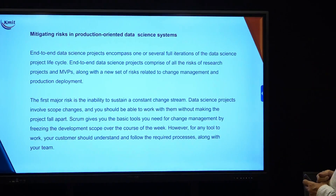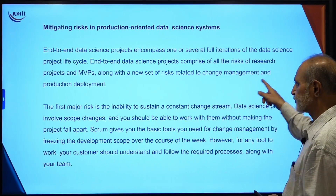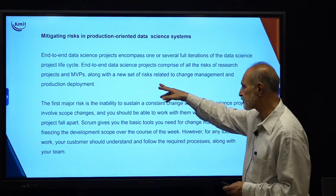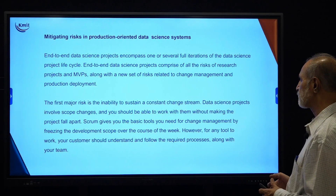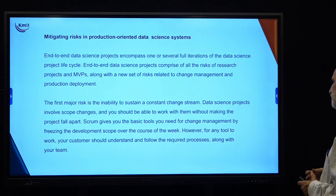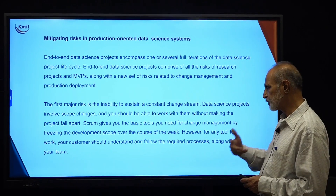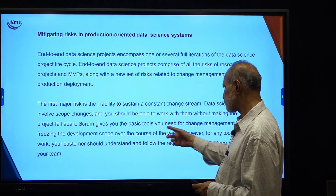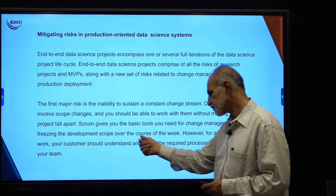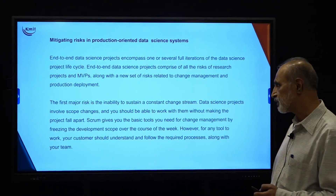End-to-end data science projects encompass one or more full iterations of the DS project life cycle. They comprise all the risks of research projects and MVPs, along with a new set of risks related to change management and product deployment. The first major risk is the inability to sustain a constant stream of changes. Data science projects involve scope changes that, over time, can make the project fall apart. Scrum gives you basic tools to manage change by freezing the development scope over the course of a sprint. However, for any tool to work, the customer should understand and follow the required processes along with your team.